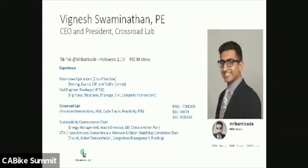And I'd also add that a lot of times we do pilot projects that are out there for a few months to observe data to convince internal staff of the need for these kinds of projects. Internally, if many of you work at agencies, I'm sure you get arguments with your own staff members about what is the right thing to do. And for a lot of very technical engineers that are just by the book and scared to innovate, they need to see the data, they need to see the observation of how that facility is being used, both from maintenance and from the user perspective.